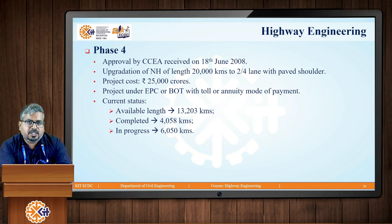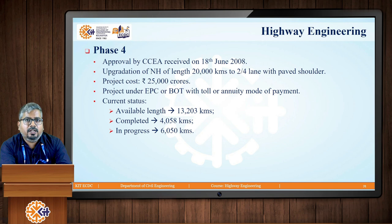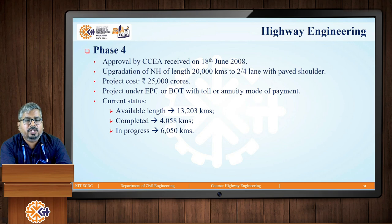The current status of Phase 4 shows an available length of 13,203 kilometers, out of which 4,058 kilometers have already been completed. Work in progress covers a stretch of 6,050 kilometers.